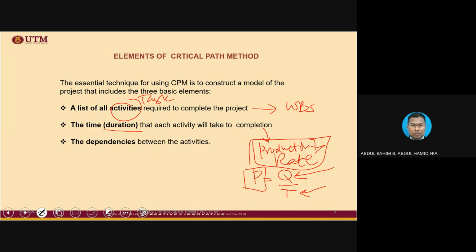So again, we need to use the technique of taking off the dependency, which is what we mean by the relationship between one activity and another. Then we can even overlap the activities, or drag the subsequent activity a little bit further away instead of starting immediately, in order to allow for some kind of delay.